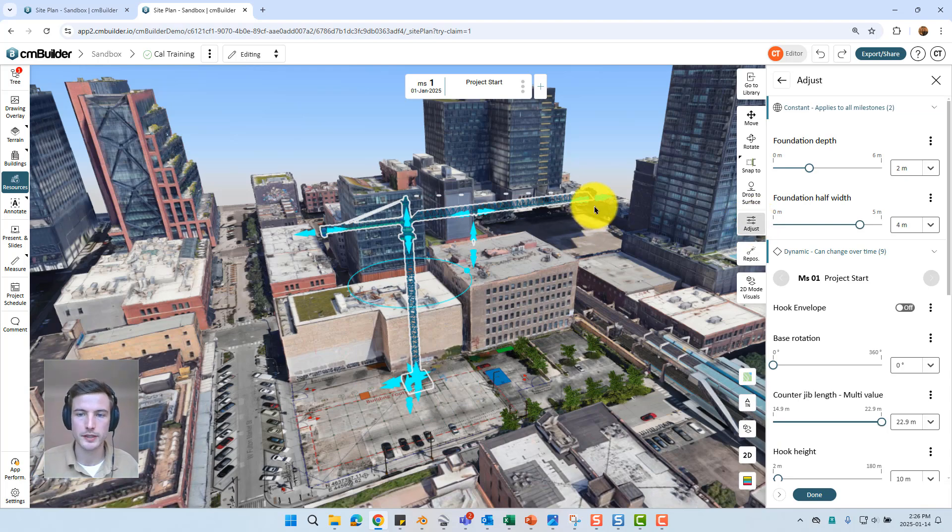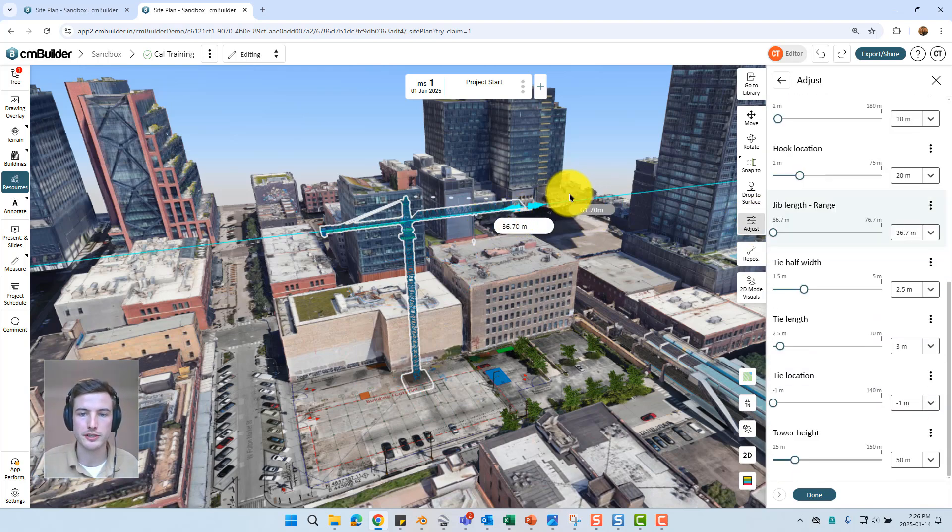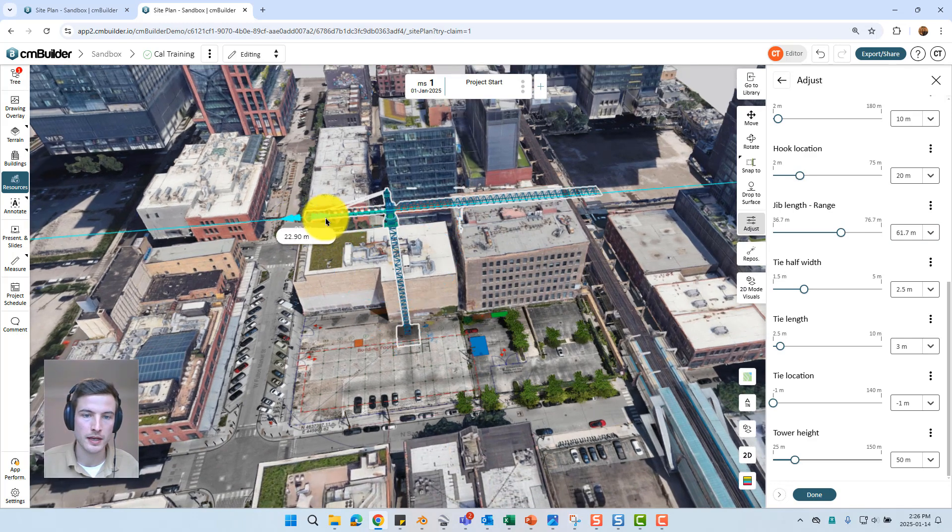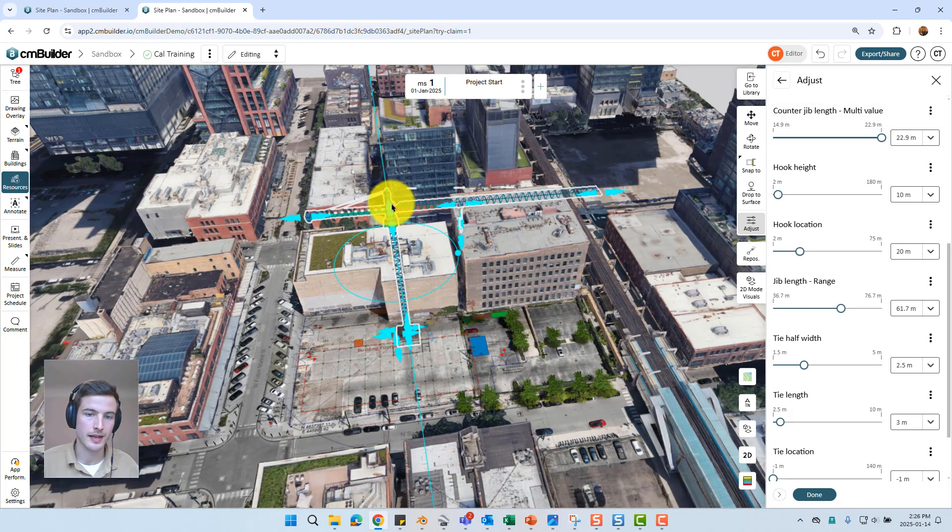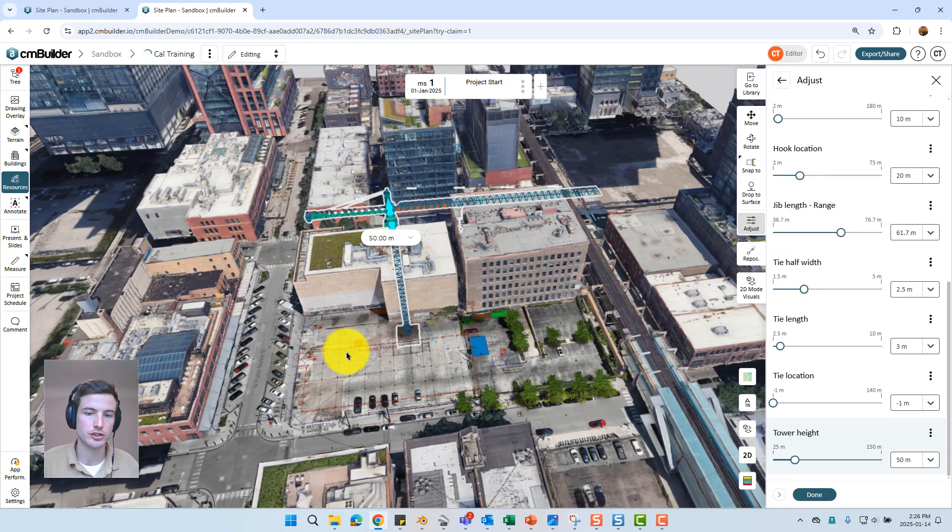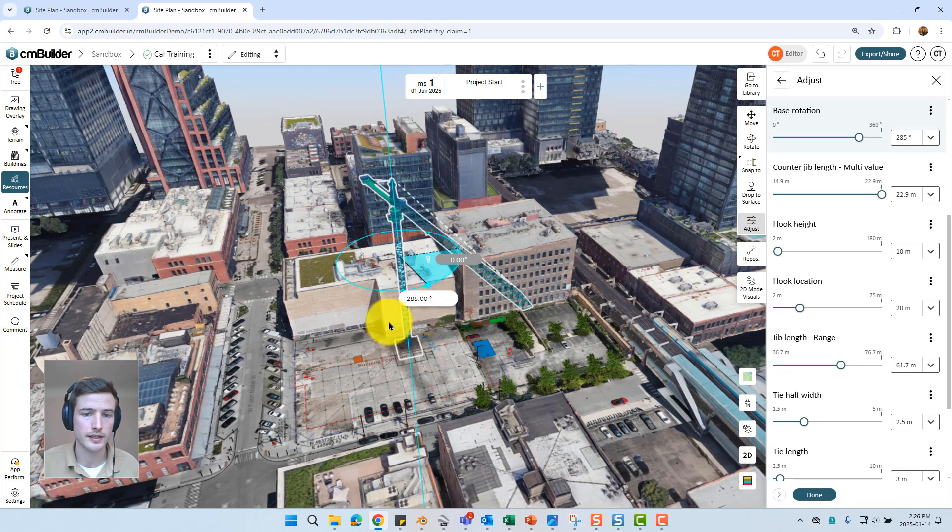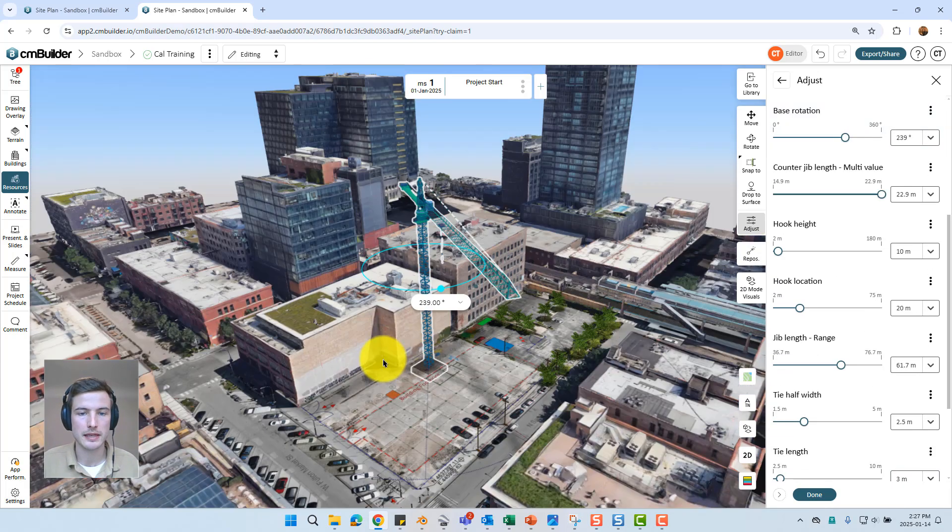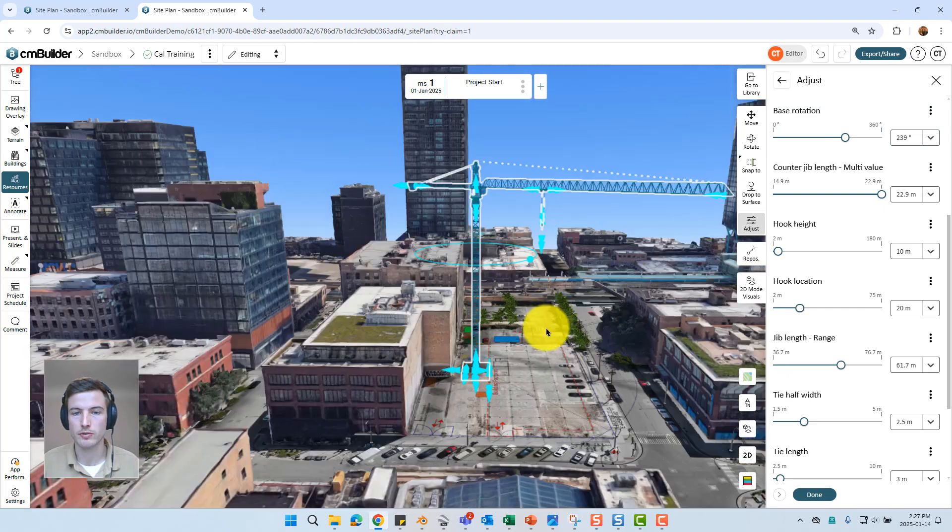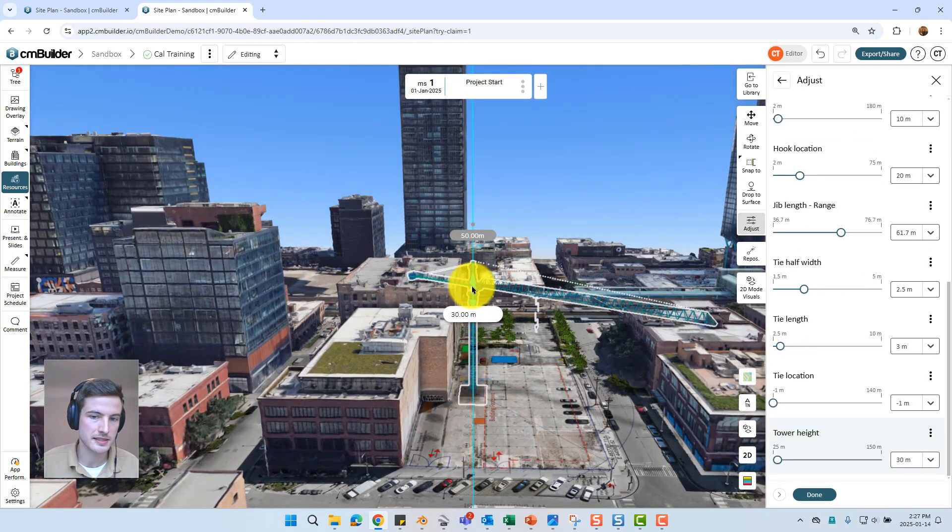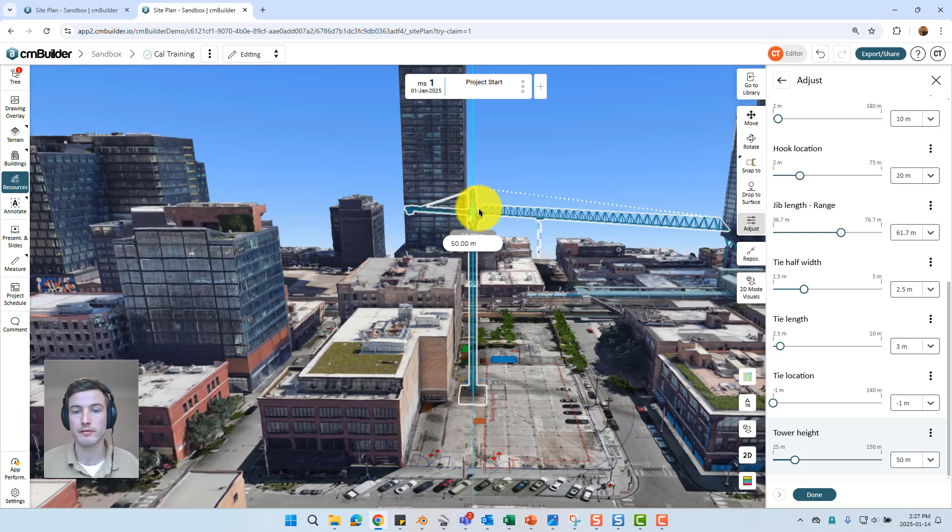The most interesting most fun option with the tower cranes or most of the resources I'd say is the adjust function. This is where we can change all the actual mechanical properties of the crane. So extend or retract the jib, counter jib or mast. And all of these are exactly accurate to manufacturer specification. Not only like the minimum and maximum lengths but even the increments in which they grow. So if JSO only makes 5 meter mast segments the screen is only going to be allowed to grow in 5 meter increments.